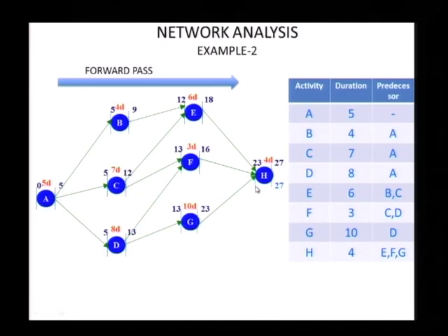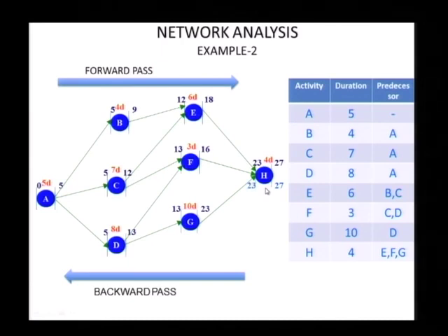So we will find that this has to complete on 27. We are fixing that, working backwards goes to 23. So what is the latest finish? Yeah, so all of this can finish as late as 23 without compromising the project duration.